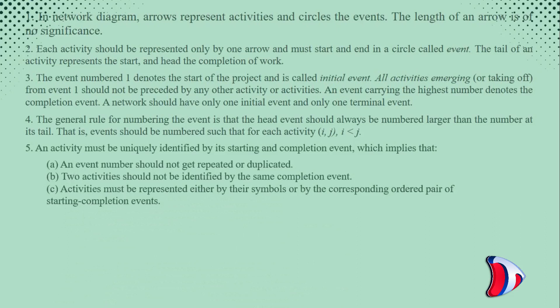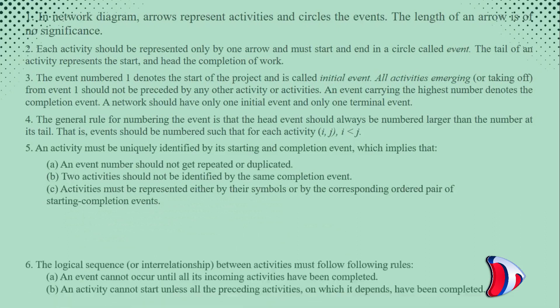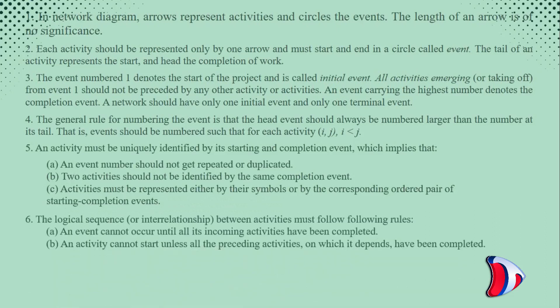The logical sequence or interrelationship between activities must follow following rules: an event cannot occur until all its incoming activities have been completed. An activity cannot start unless all the preceding activities on which it depends have been completed.